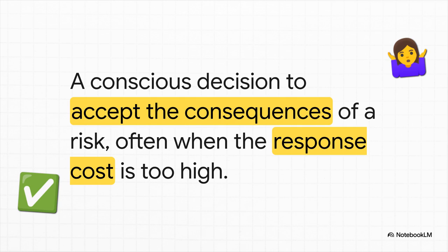And finally, sometimes the smartest move is to just accept the risk. You look at it and realize that the cost of trying to fix it is actually way higher than the potential damage it could cause. So you make a conscious choice to do nothing for now, but you keep it on your radar and monitor it. This is usually for your low priority stuff.